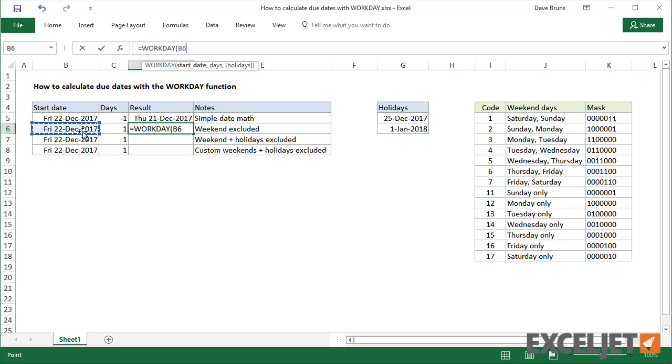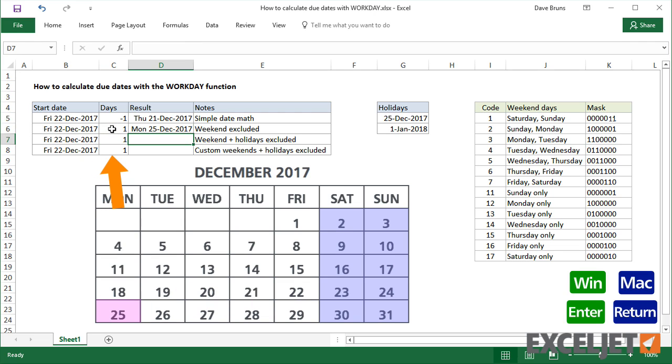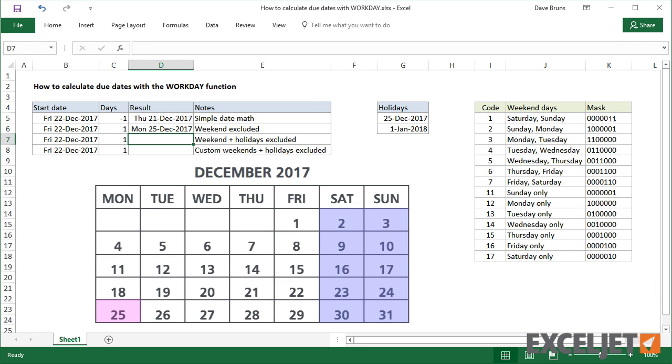To skip weekends, I just need to give Workday the start date from column B and the day value from column C. With a value of 1 day, the result is December 25th, a Monday. Workday skips the weekend.